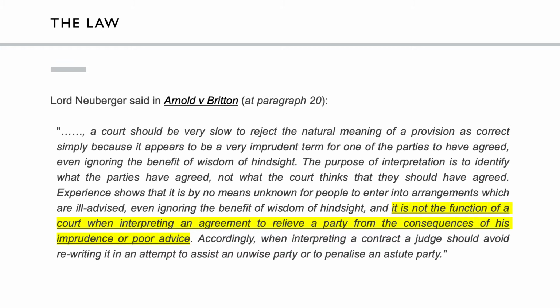To give you an example, in the office contract that I mentioned earlier, it didn't matter that the parties had clearly meant to include the schedule of amendments in the contract, or that there was clear negotiation back and forth on that schedule of amendments. The contract just didn't include it, and therefore the employer did not achieve the single point responsibility for design and construction that it had hoped for. The contract had been executed as a deed, and the only way to resolve the issue was to ask the parties to enter into a deed of amendment.